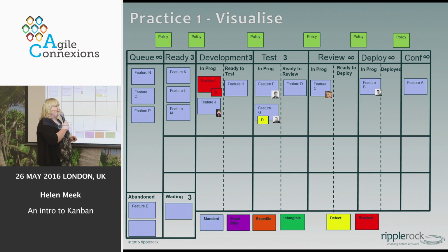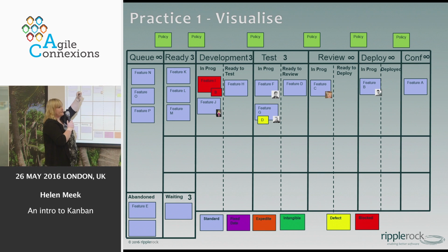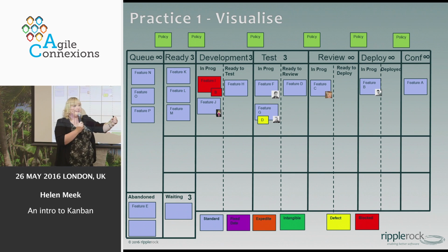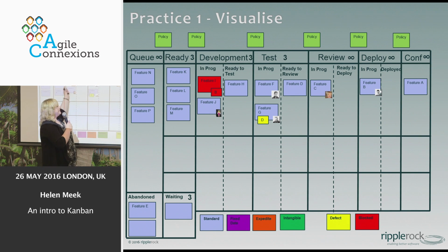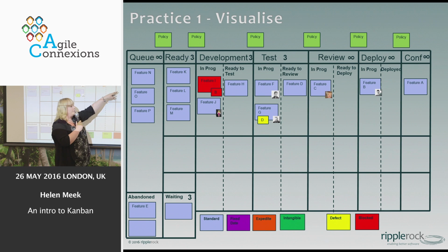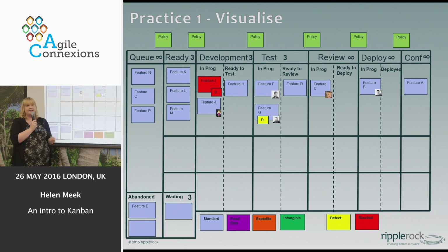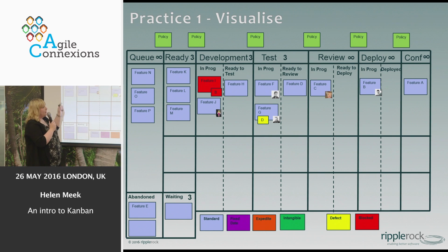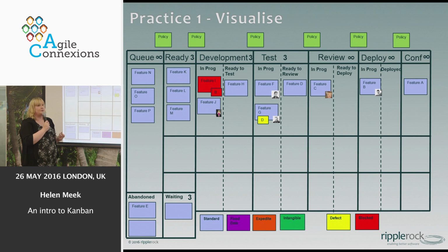Now, another thing you have with your visualization here is some commitment points. Your first commitment point is ready, and that means I'm ready to take this piece of work on. You can agree to stop it, or we can start it now. Your second commitment point is at the point where you're ready to say it's done and we can deploy it out the door, because you have a choice to let it out the door or not. On your board, you will also have a start and stop, really, and this is your lead time.